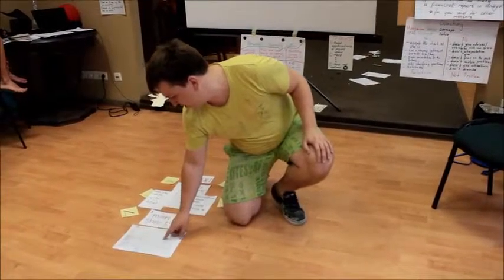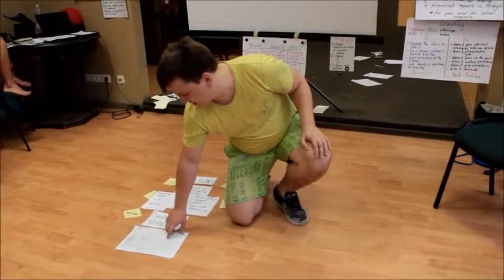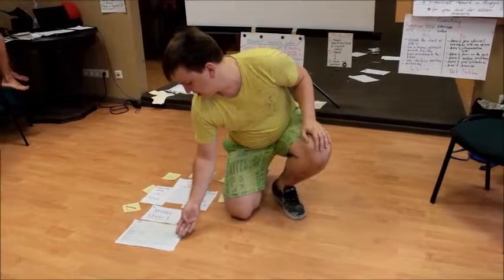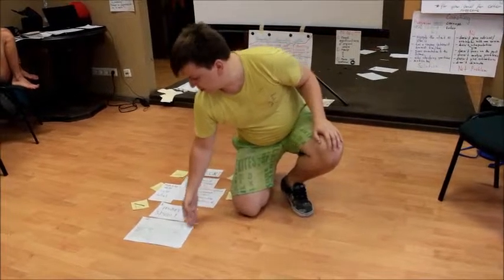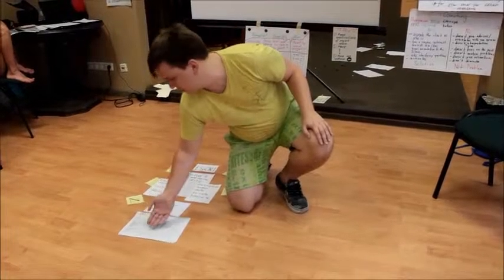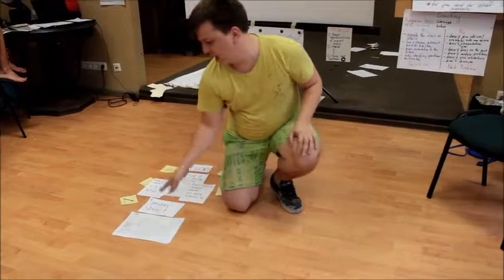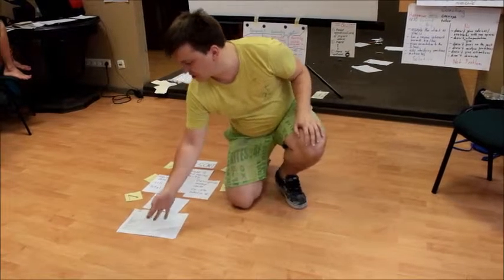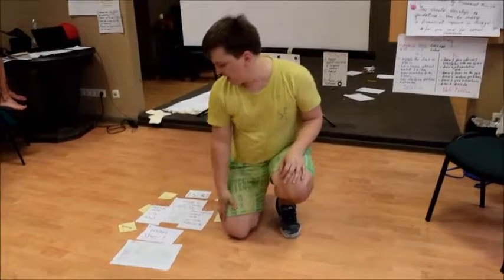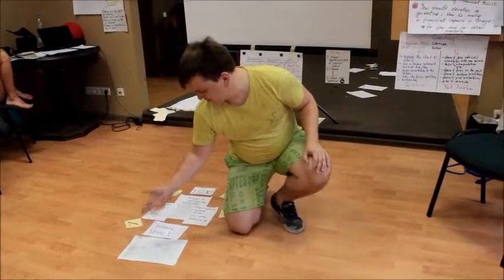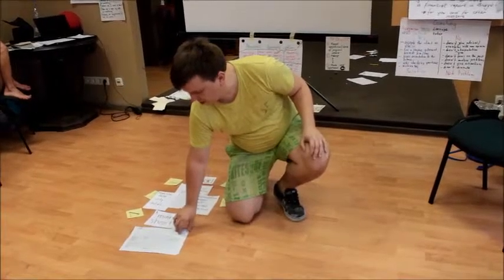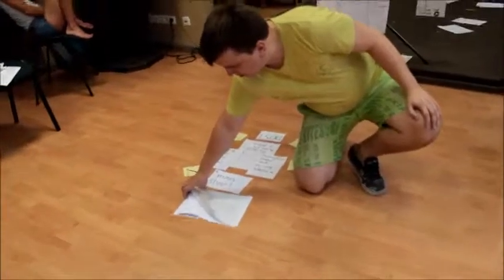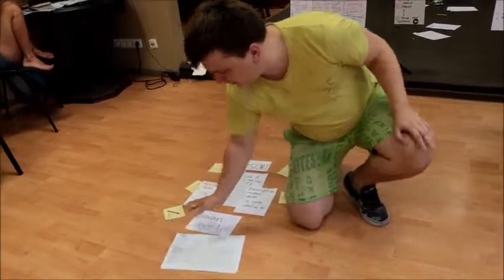You write down how much you spent, and here you transfer how much you planned to spend, and you can calculate the difference. You can calculate the total for each cost and for each source of financing, and it's very clear. This is the main page of your financial report. Here you put your signature so that you're responsible for it, and then you put this sheet on the top and all the others at the bottom, so that it is very clear for the person who will check it. So that's it.